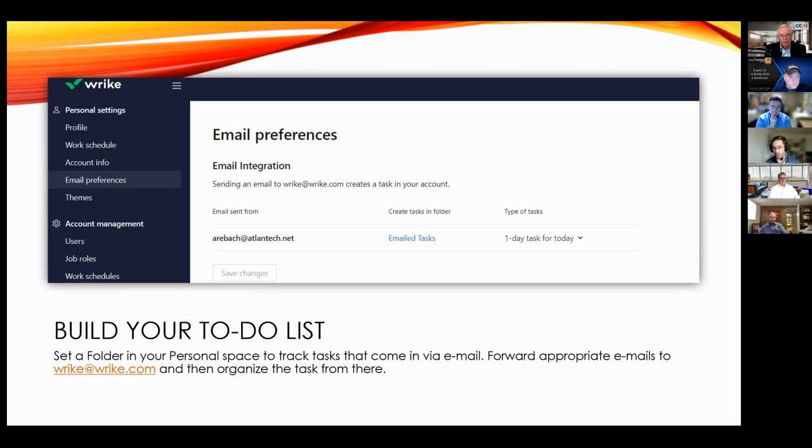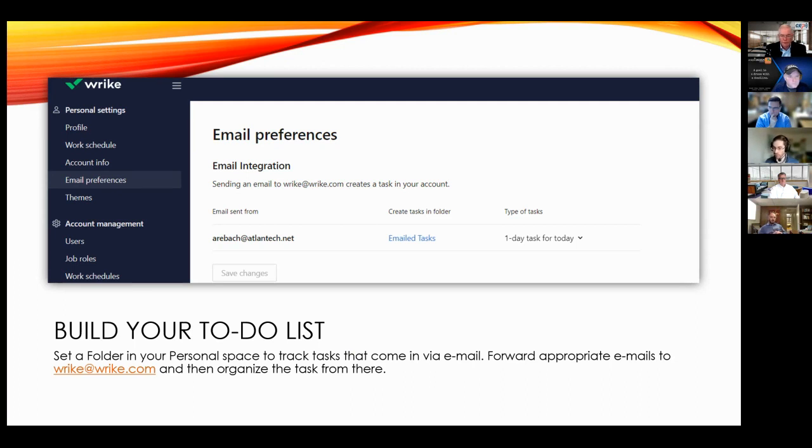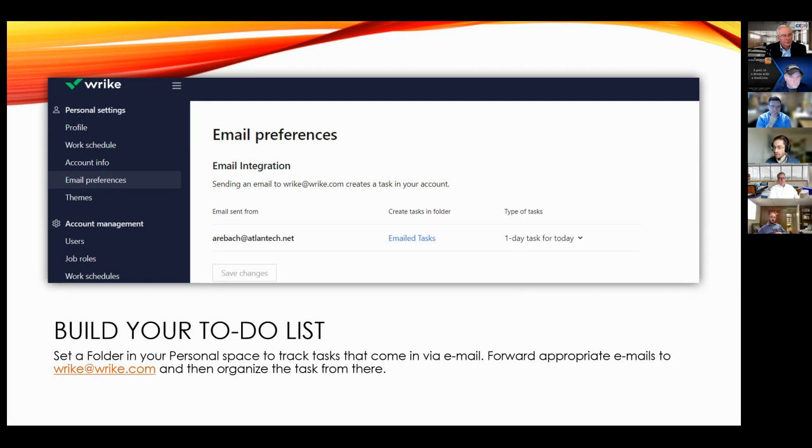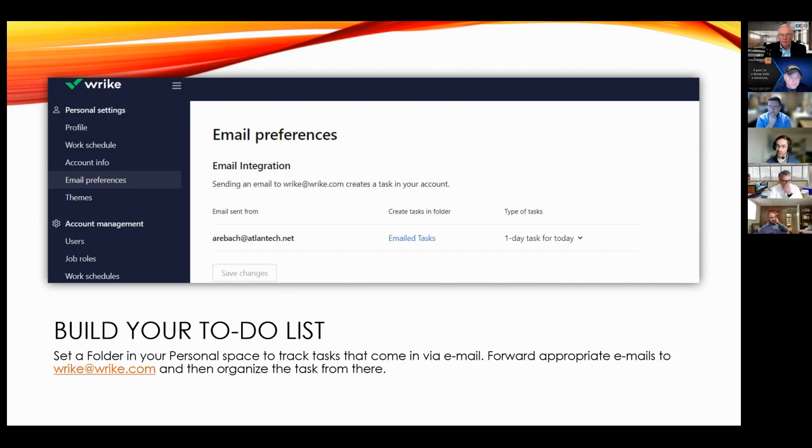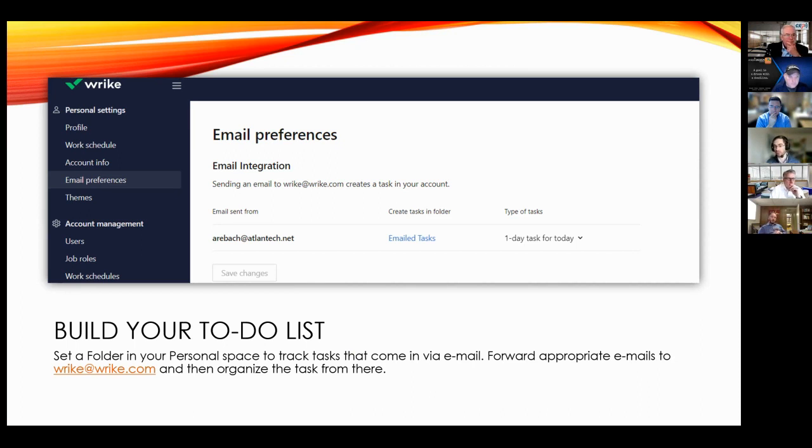I'm going to dig into some nuances of Wrike with some of these screenshots. The first that I wanted to highlight was the capability of integrating email with a specific folder in your Wrike space. So Wrike has a generic email address that you can map to any space in any folder. And so I have one called email tasks. So when I get my daily question from Ed, I can track all of those and make sure I'm executing and getting those items answered and to the right people. So I have a quick email address, an Outlook contact associated with it. I just forward the email, it creates a task, and I have a dashboard that tracks all of those so I can assign them out, make sure that I'm closing out the items and getting Ed the information he needs. So if you deal with a lot of email and are trying to make sure you stay on track of it, Wrike has an answer for that.